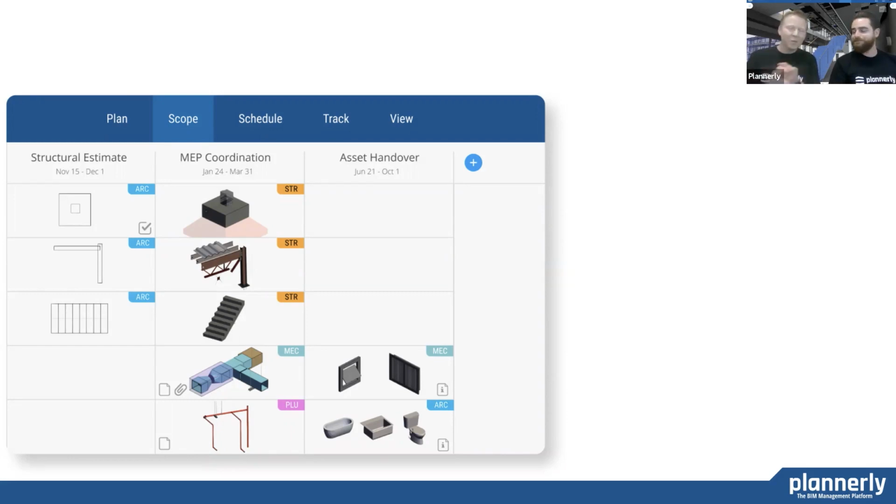Unnecessary elements. Yep. So a lot of the time we see the plague of using, whether it's a task information delivery plan, master information, however you want to term it, whether it's asset information register, whether it's LOD matrix, whether it's a model progression specification, whatever you want to call these things. So we cringe when we see a table that's completed with every single one of those cells that has some content required. What we look for is a lean deliverable. Yep. And this allows us to focus on what is required and make sure that there's a customer for each one.